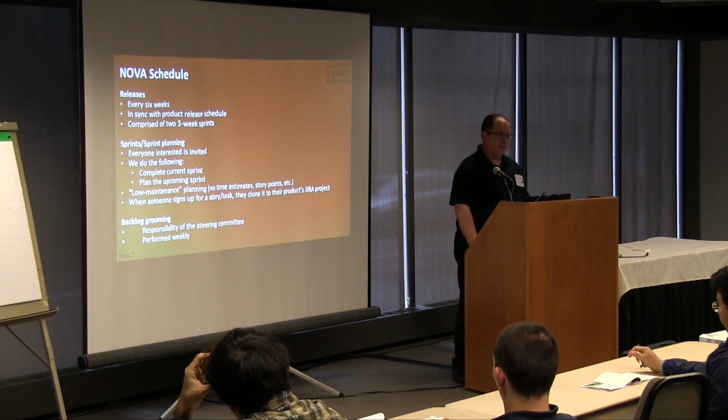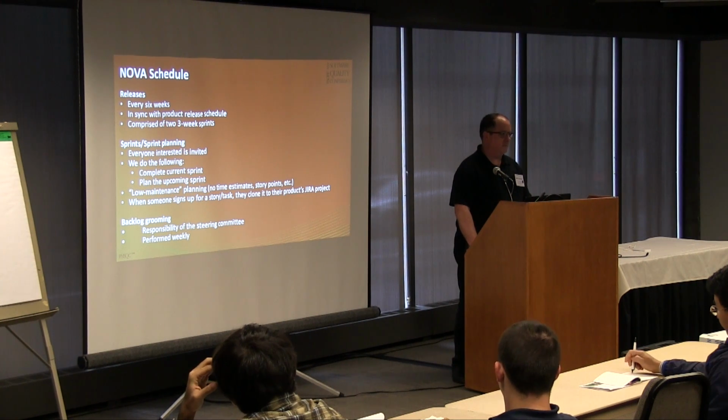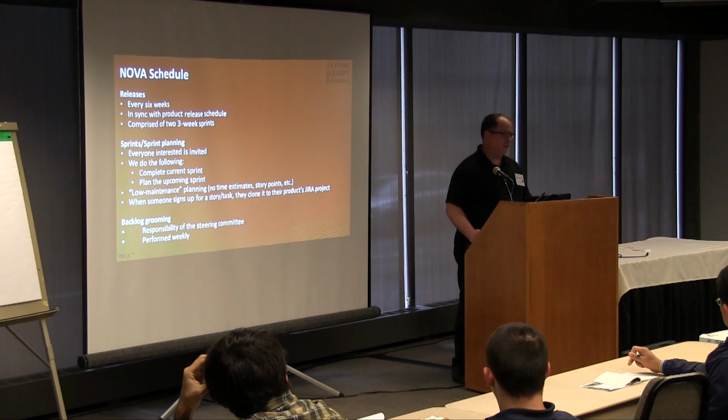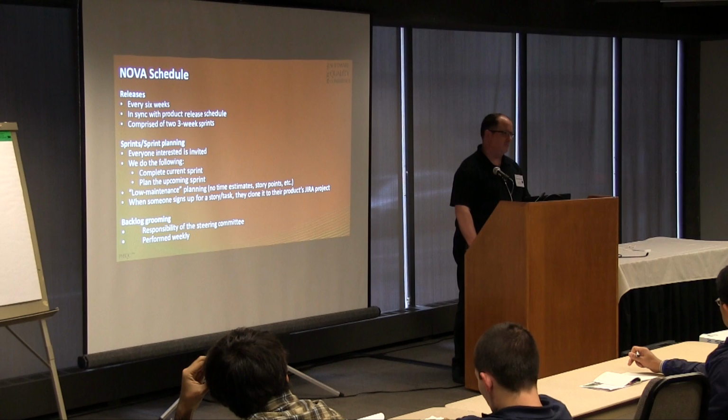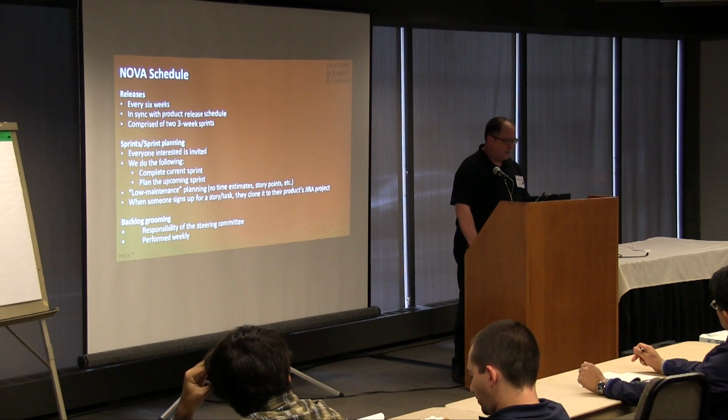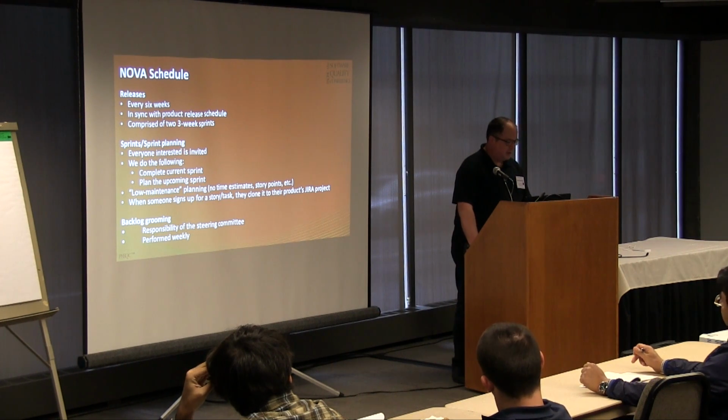And then, about halfway through the sprint, we remind people, hey, you signed up for this, make sure it's updated. Let me know if you run into any issues. And then when we get to the end of the sprint, we either close the stories because they're completed, or if somebody says, hey, this other thing came up on my product, I didn't have time to work on this, we say, okay, and we just move it to the next sprint. No big deal. And so that's what I mean when I say it's low maintenance.